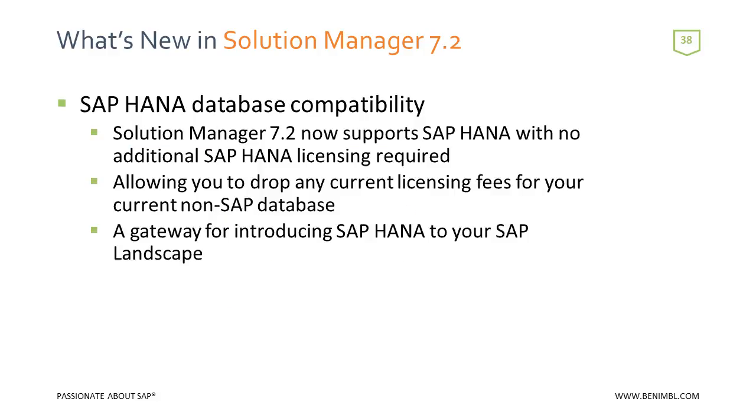As Steve mentioned, Solution Manager 7.2 utilizes HANA as well. So keep in mind, when you're planning an upgrade to 7.2, you're going to want to think about migrating to HANA, but also plan out your strategy as far as the upgrade process, because the actual technical side of the upgrade includes the upgrade, the splitting of the dual stacks, and then the actual migration to HANA.